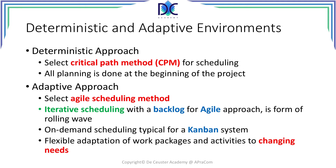Let's look at the difference between a deterministic and adaptive environment when planning projects. In the deterministic approach, scheduling is done by the critical path method, which we will see later in chapter 7. All the planning is done at the beginning of the project.